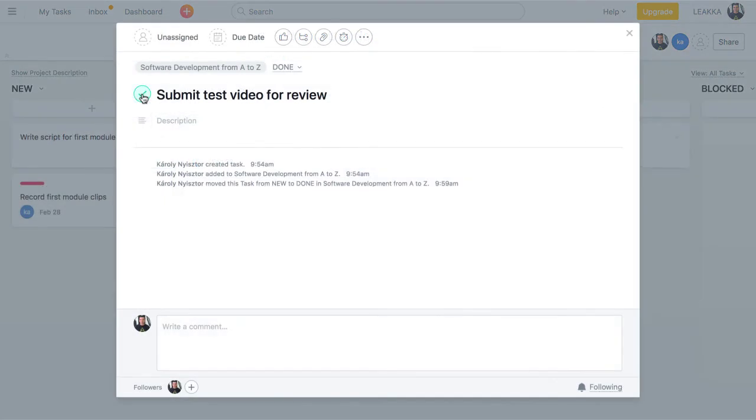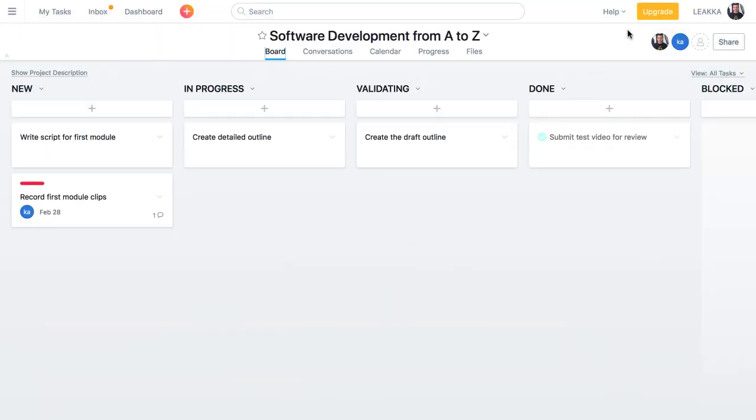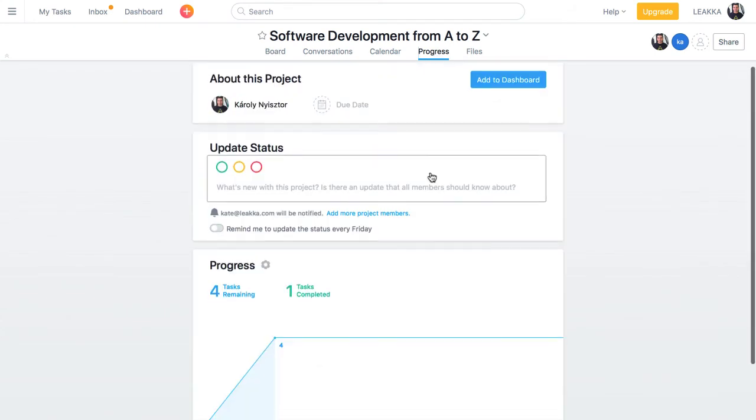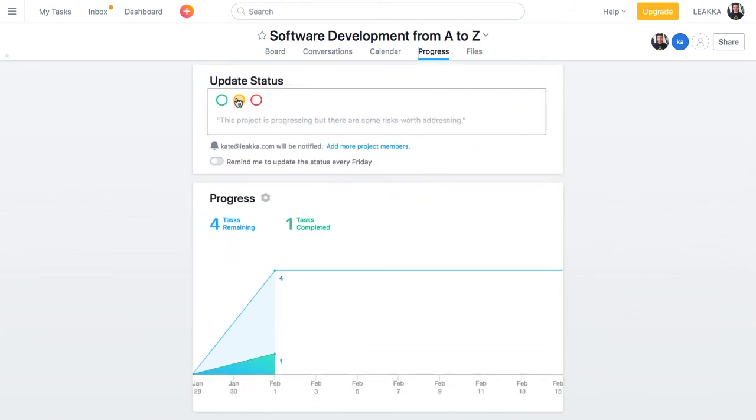Tasks marked as completed contribute to the overall progress. We can track the progress in the progress view, which also lets us update the project's status manually.